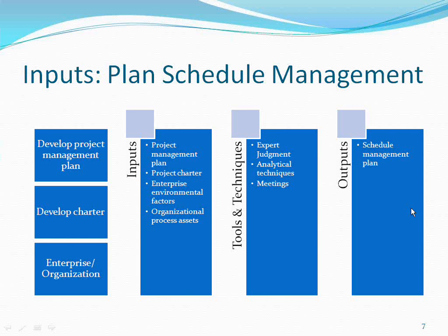So if you are constructing, say, a foundation, and it rains, so add some buffer. We always do that. You know that a particular activity will take 5 hours, but you add some buffer, some reserve to that. Say 6 hours, don't say 5 hours. 1 hour we will take as a contingency. Contingency is when you are working on something, if there is some risk, the reserve you have set aside for this risk is called contingency.